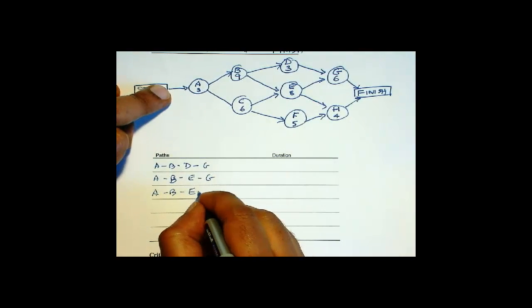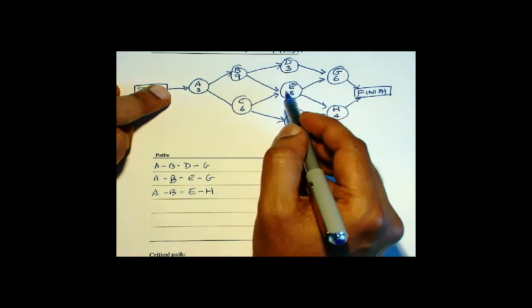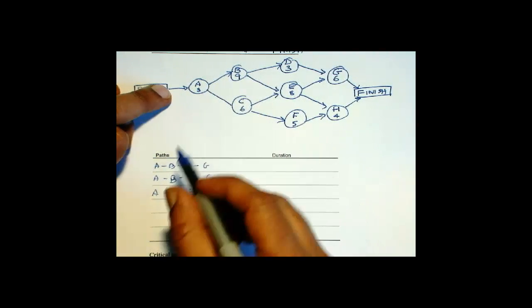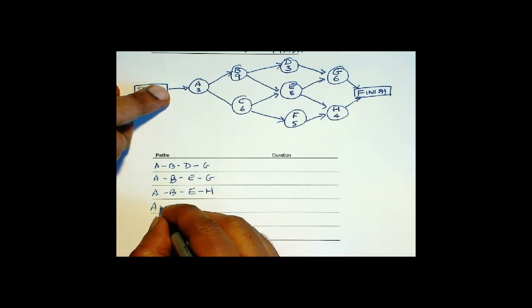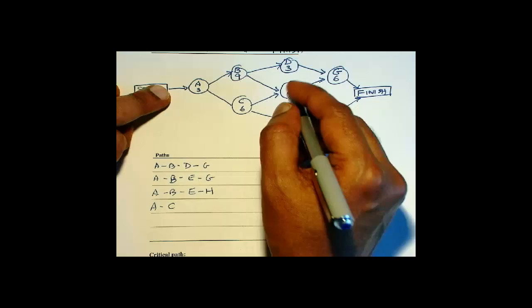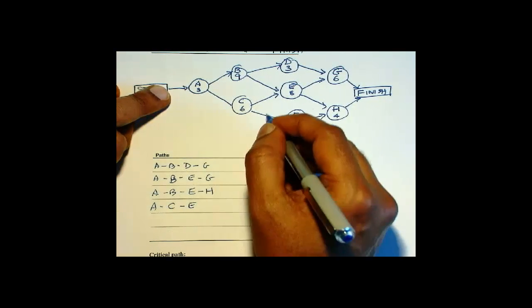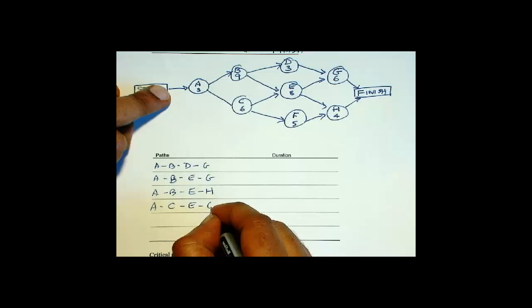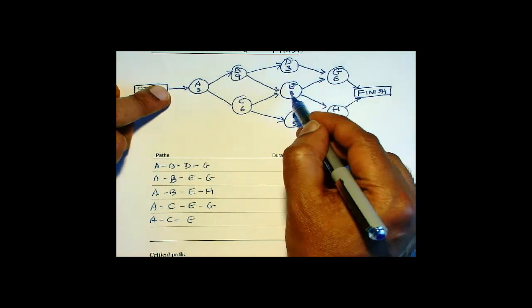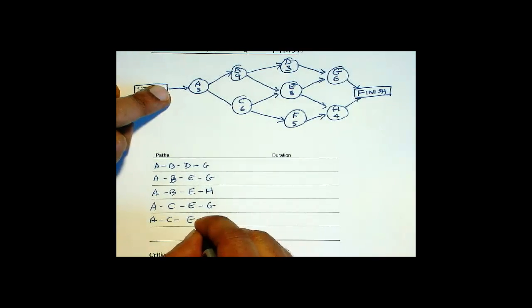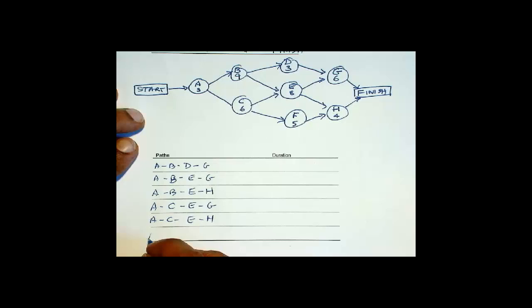Now go back to A and make the other choice: C. And once again take the upper choice — E and G. Then trace back to E and take the other choice: H. Then trace back further and you get A, C, F, H. So these are all the paths.